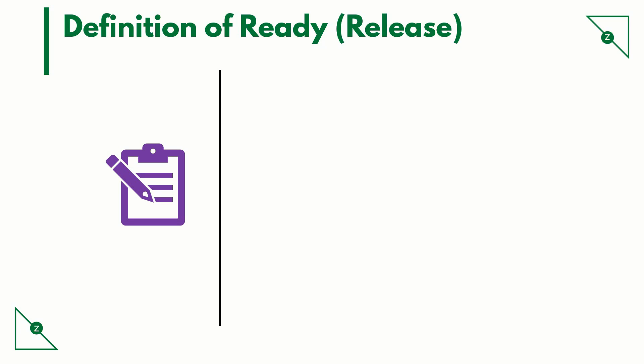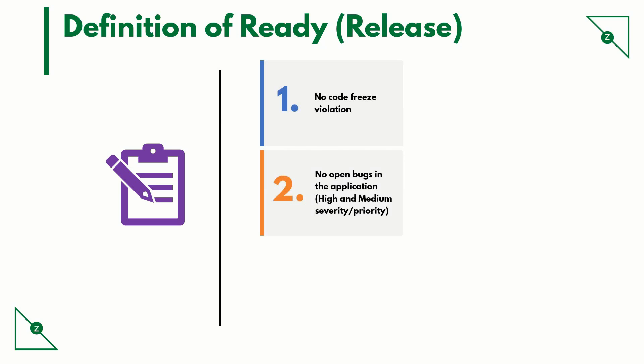Here are some example pointers for definition of ready for a release. No code freeze violation — that is, no code has been checked in by the developers during the code freeze duration without the approval of the approvers or the knowledge of the QA. No open bugs in the application. The amount of bugs allowed in every severity or bucket can be predefined.